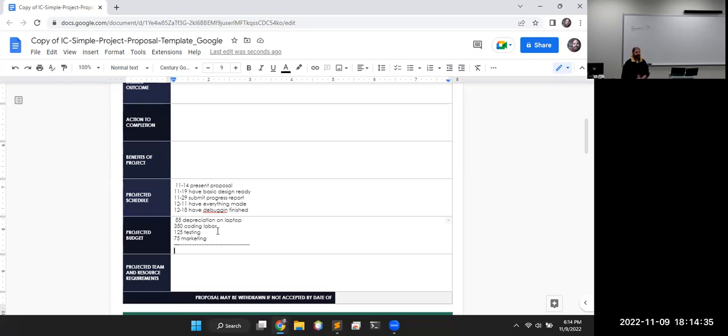because the general trend is just to go high, right? Bid too high so that people are happy when you come in under budget. But if you're just arbitrarily bidding high, you might miss some things. And then your high bid turns out to be too low anyway. Or you might miss some of the points in the schedule and get way, way off in the timeline.